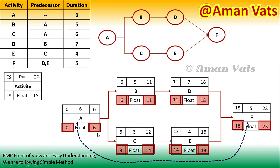We also calculated 6 plus 6 equals 12, because the early finish of 6 carries forward and 6 plus 6 is 12. Then 12 plus 4 equals 16. Now here we have 16 and here we have 18, so we take the greatest value, which is 18. Then 18 plus 5 equals 23. That was all about calculating early start and early finish using the forward pass method, and now I'm going to the backward pass.